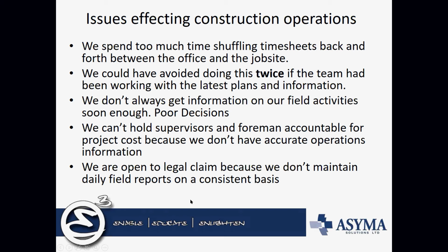And then the last one, which is legal claims. And this is certainly a possibility if you're not doing daily field reports on a consistent basis. And really all it is it's like a diary on what happened for the day. But when you're doing these daily field reports, you can collect the time for the employees, the time for the equipment, the subcontractors' times. You can keep track of all of the material that's being used. And so all of that stuff is flowing into these reports. So you've got what's going on, what's happening in the job itself or at the job site, and all of that flows right into the project.